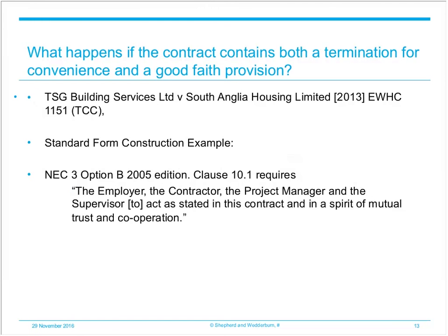The court's reluctance to intervene in contracts by implying a general good faith obligation is clear, but there are construction contracts that have express good faith provisions. It might be common sense to think that this good faith provision would apply to termination for convenience clauses in the same contract. However, in TSG Building Services against South Anglia Housing in 2013, Mr. Justice Akenhead held that a partnering good faith clause in a contract did not impinge upon either party's right under that contract to terminate the contract at will, even where the purpose of doing so was to give the works to another contractor.